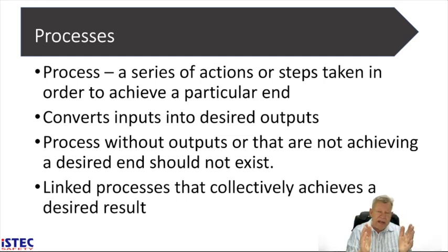If I do the initial risk assessment, I have certain inputs, knowledge and people and observations and the law. I output from the risk assessment process a risk profile. Now, I take the risk profile and I identify the high risks.